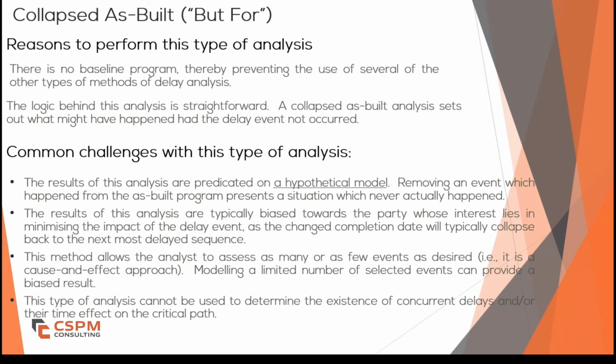By removing a delay event, we assume that the project would have continued without interruption and that no other factors would have influenced progress. However, in real-world construction, removing one delay does not necessarily mean that the project would have finished sooner. This assumption-based approach makes it difficult to argue this method as completely objective analysis, especially in legal disputes where precise cause and effect relationships are needed.